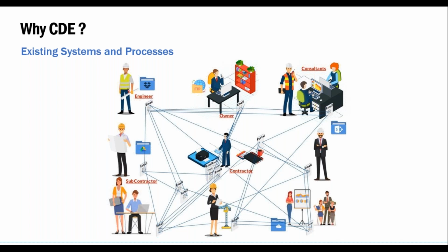further activity takes place. So it is about, number one, handling the data which is sent across to multiple people. Second is managing the process of ensuring that the right people get the information and the right approvals are there. And third is keeping the information in a centralized repository so that anybody accessing that information, depending on their access level, always gets only the latest information.